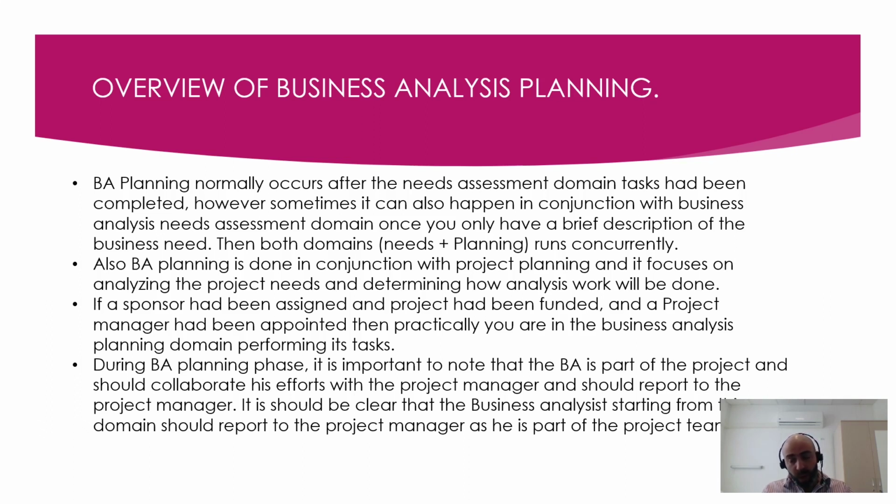So how do we know when to start the business analysis planning? Some people might be confused about this. The ideal situation is to start once you hear that there is a business case, a sponsor is assigned, and a project manager is allocated to the project.